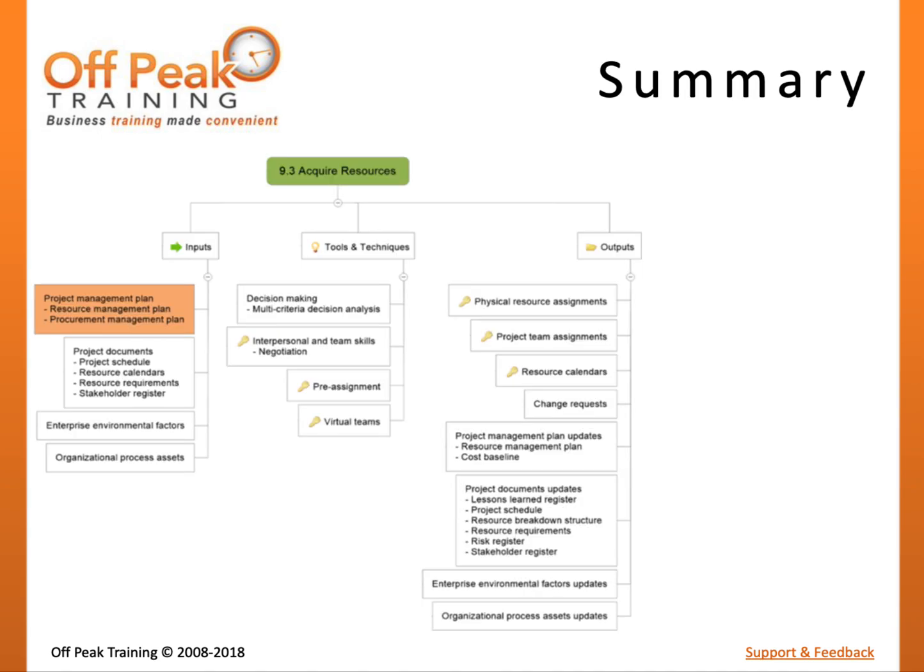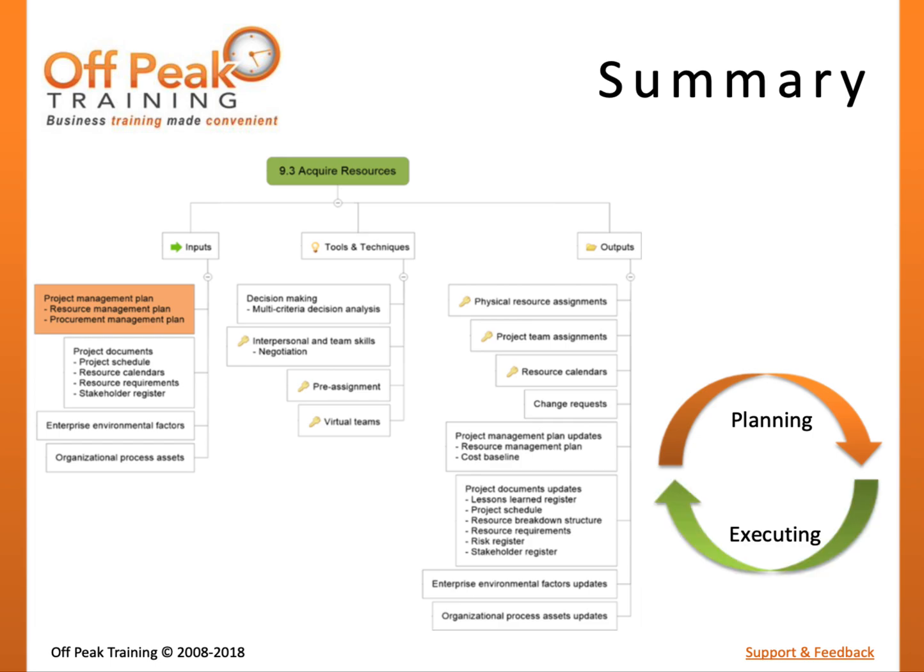Acquire resources is the process of assigning and hiring personnel necessary to execute the project. This process builds on the resource requirements established in the Estimate Activity Resources process to assign individuals to project schedule activities. A general understanding of resource requirements is needed before acquisition can begin. However, acquisition will lead to a better understanding of who the resources are and what their availability is, which is an input to schedule planning. Therefore, we can say that the relationship between time planning and resource executing is iterative.